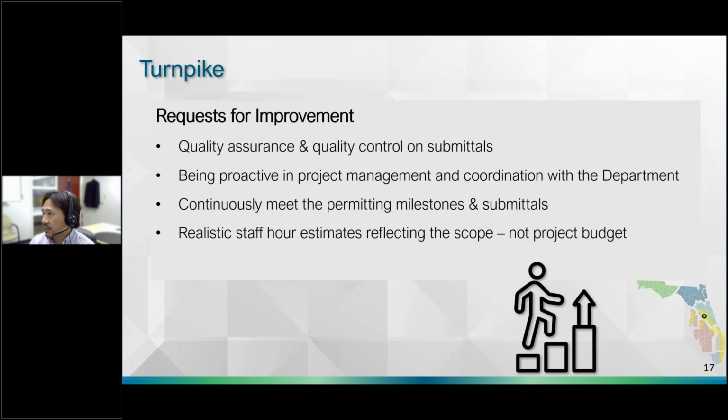Number three, another statewide concern, delay on the permitting. Again, it is important to cross coordinate with the department on which permits are required and build permitting milestones within the project schedule. Other suggestions to improve this process might include early coordination with the permitting agency, appropriate and thorough environmental data collection, incorporating the field data, and providing a complete and accurate final permit application. The goal is to make sure that all permits are clear prior to production.